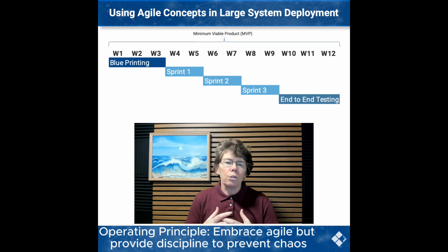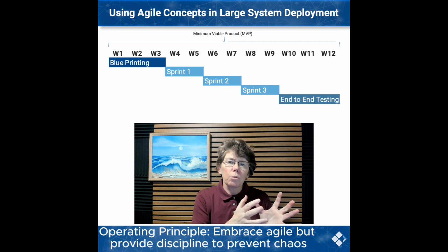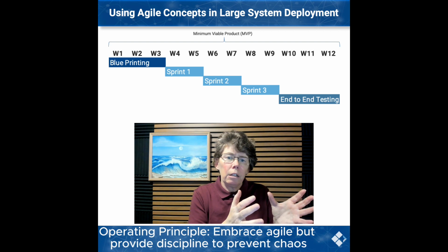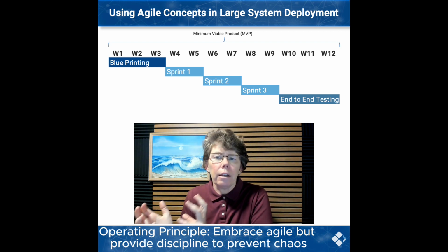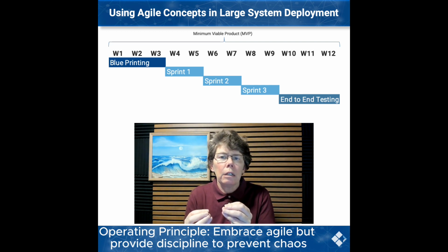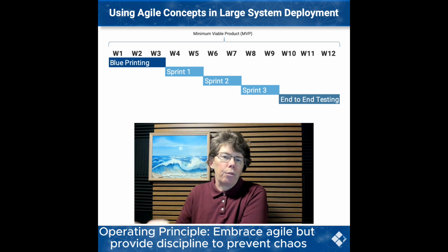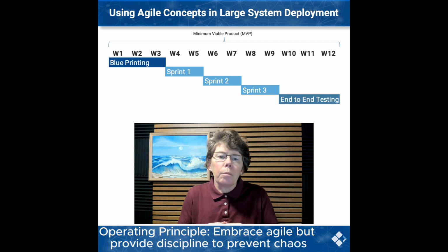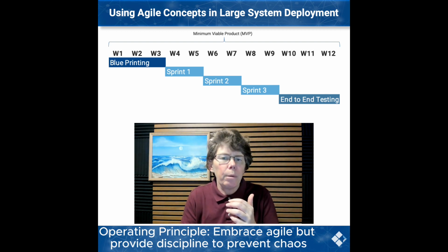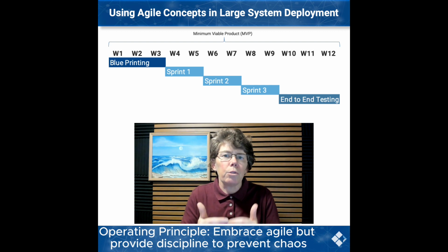We at ClearIQ still believe the front-end blueprinting is required, or functional design, so you know what you're building toward in its entirety. And we believe the end state end-to-end testing is required. What's inside that minimum viable product for the first release, or the second release, or the third release can be built by the IT team in sprints, gaining some of the benefit of Agile, where you're working on specific things, you're getting better feedback, you're having more time to maybe do some cycles of testing.